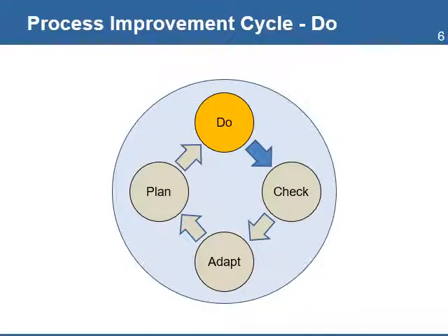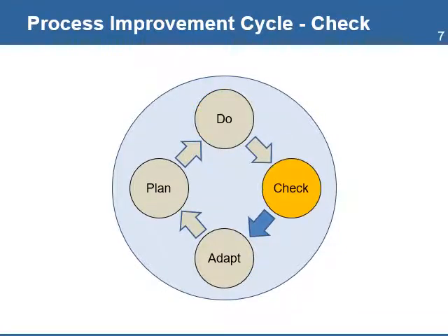This is a step where the management processes are carried out by the people responsible for it. This is where the process produces the outputs that will contribute to the achievement of the outcomes. In this step, the process is monitored, controlled, and revised to ensure it is performing as expected and is producing the planned outputs. This step is important because it allows you to review the plan, analyze the results, and identify the causes for any deviations from the plan.